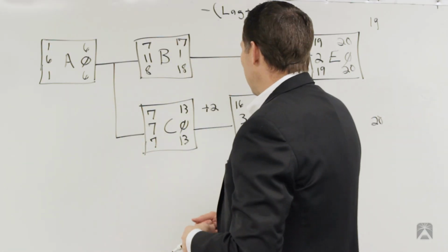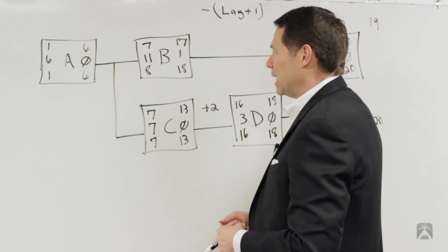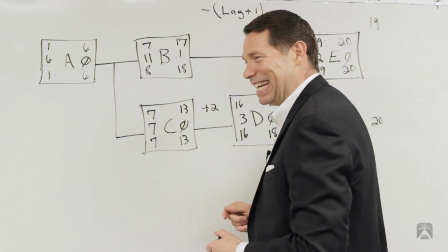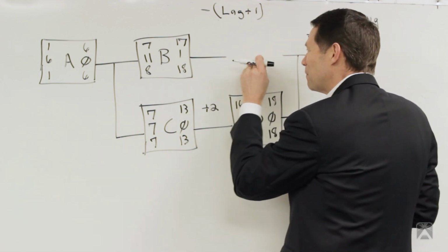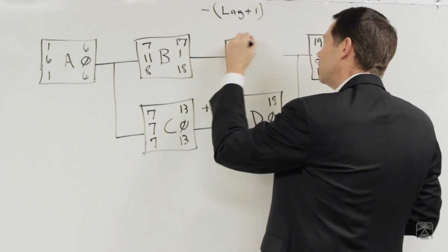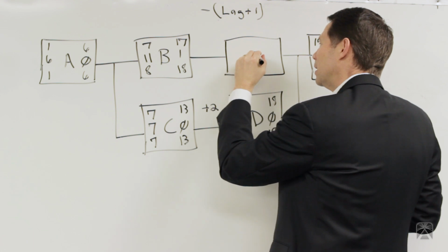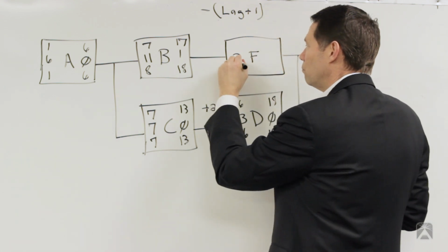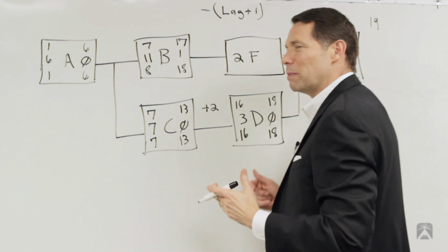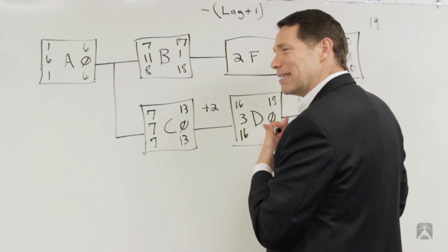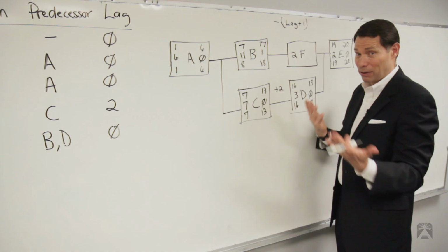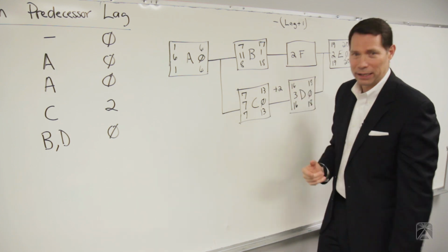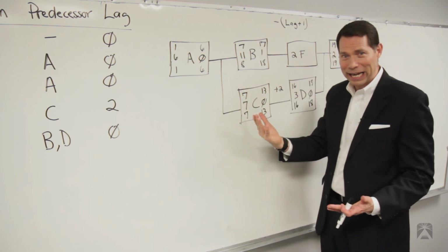It might say, activity F is added between B and before E, okay? So activity F is effectively added right here. And it's a duration of, let's say, 2. The question might be, does it add 2 days? Or how many days does it add? And the question might be none. So how many does it add? Well, we could go back and do a full forward pass and a backward pass. We can figure that out.